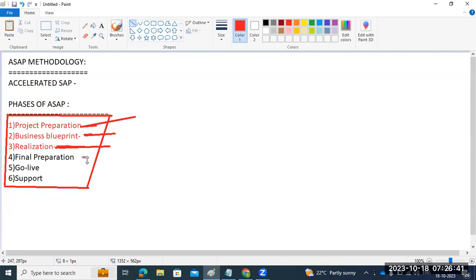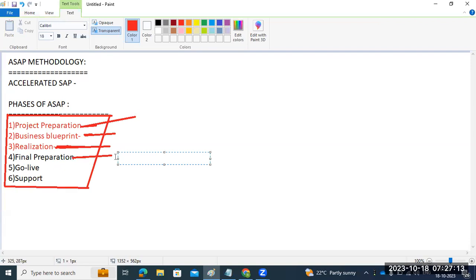The fourth one is called the final preparation. Phases 3 and 4 will merge here. Phase 3 means knowledge transfer, building the systems and initial configuration, which is a very long running phase. Once this is completed, then come trainings, final preparations, tuning and workload testing. This is the actual testing, because before go live we do workload testing, smoke testing and final configurations.